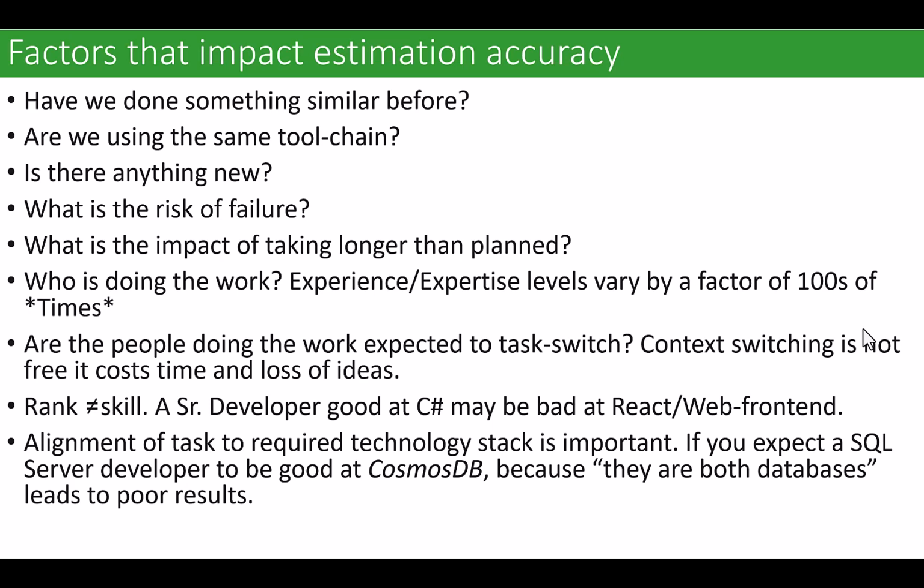Are we assigning a task to someone who hasn't necessarily done that thing in that area of expertise, or with a tool chain that they're unfamiliar with, and poor assumptions about the alignment of roles to tasks? My favorite recently was someone who said, well, let's take Sandy because she's a SQL developer, and let's let her do a NoSQL database because they're all databases. It won't be difficult for her to figure this out. These are all things that have to be questioned during the estimation process.